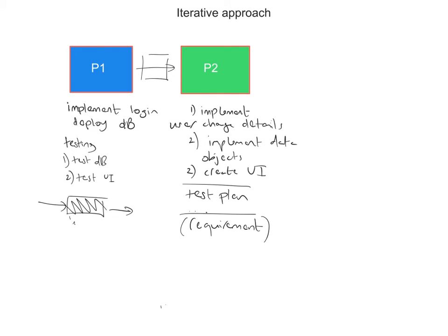Or is it a nice to have? We've seen something and we thought that's a great feature. It'd be great if we can put it in. In that case, we can park it. But what do we do with this requirement at this stage? Well, what we should do is again do our due diligence with it.